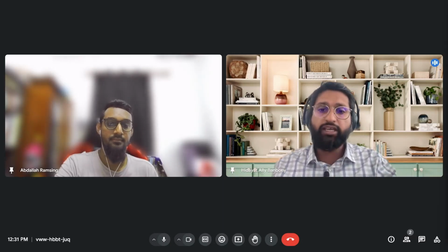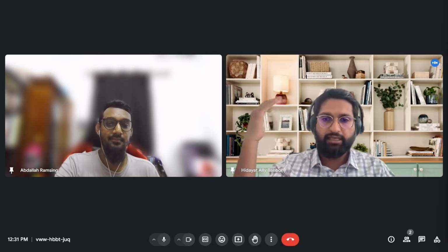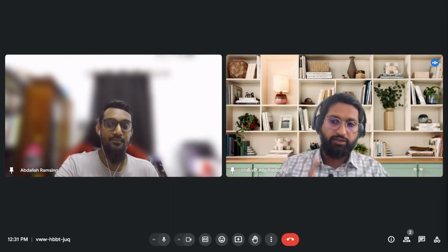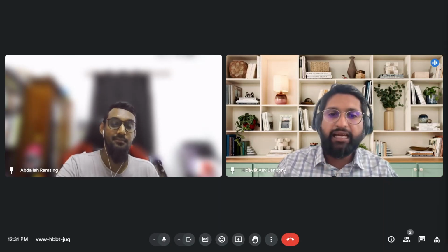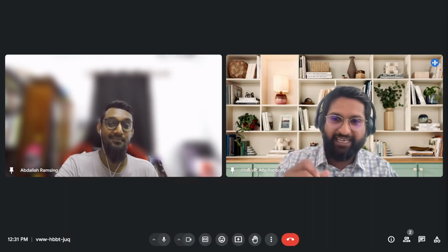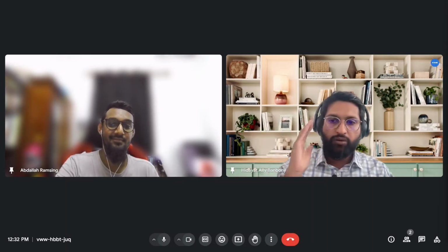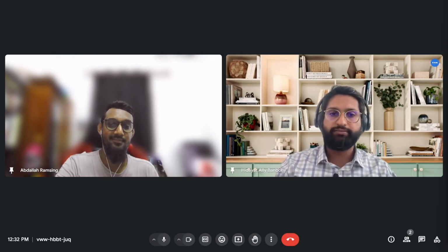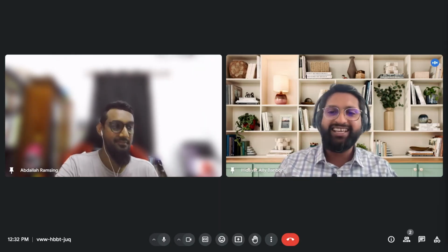For example, is it the architect? Is it the product owner? Is it the scrum master? Is it the PM? Is it a developer? Is it the QA? So that's step number two. Step number three, a deadline for this action. You're not going to get it if you just think, okay guys, by mid of next sprint we should have a reply on this one. If you don't put a deadline, you won't have anything, right?